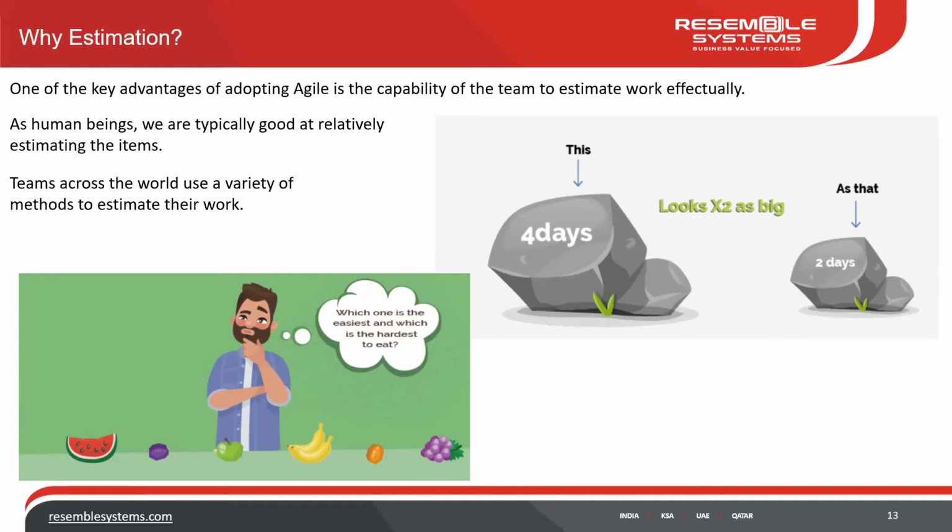And we also have something called a bottom up approach, where I take the tasks. Okay, I need 10 tasks to finish this. For example, I need 4 pillars of flooring, and after I complete that, my living room will be finished. After that, it goes on. So when you go from below, it is called a bottom up approach, and when you break things from the top, it is called a top down approach, right? In Agile, we always do a top down approach, and we come to a level where we are confident and start estimating, which I told you is the user story, right?